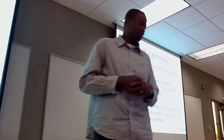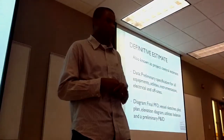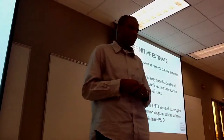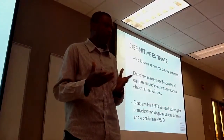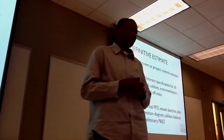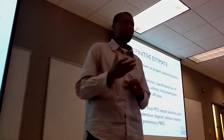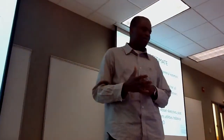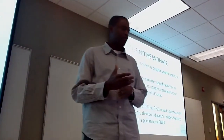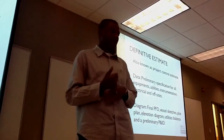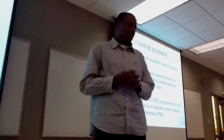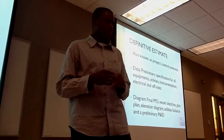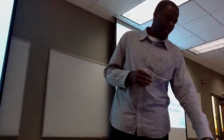The definitive estimate is also known as the project control estimate. The data required includes primary specifications for all equipment, utilities, instrumentation, electrical, and off-site. The diagrams required are the final process flow diagram, vessel sketches, the plant layout, elevation diagrams, utility balance, and the preliminary P&ID diagram.